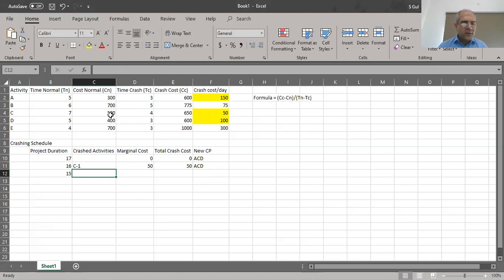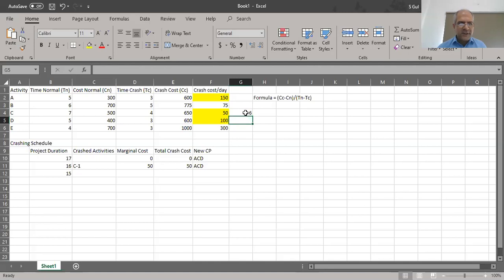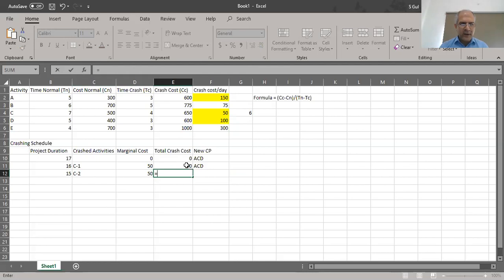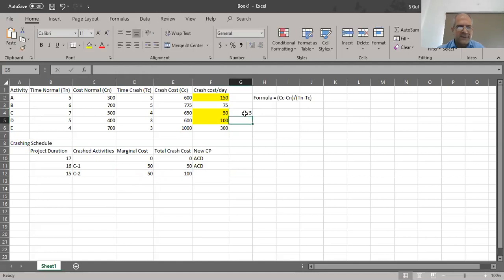We crash activity C for the second time, bringing it from six to five days. The marginal cost is $50 again, making the running total $100. C has now been reduced from its original seven days down to five days. Going back to ProjectLibre and updating C to five days, we notice that all activities are now showing as red — meaning all paths have become critical.